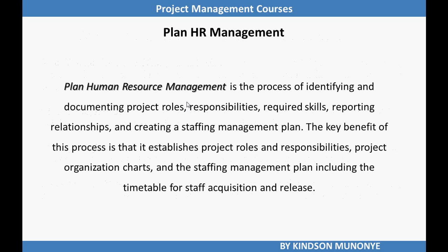Let's now drill in to look at these processes one after the other, starting with the first one, Plan Human Resource Management. Sometimes I refer to it as Plan HR Management. Plan Human Resource Management is the process of identifying and documenting project roles, responsibilities, required skills, reporting relationships, and creating a staffing management plan.